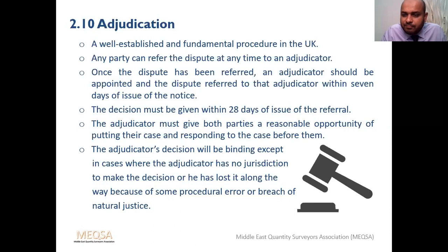The adjudicator must give both parties reasonable opportunities and should listen. The adjudicator's decision is binding unless they go to the court. So what you should understand here is that such a process will be there. There will be a third party adjudicator, he'll be listening to your case. Both will get a similar opportunity. At the end of the day, the adjudicator should give his wording, same like a judge. So to have an adjudicator role, you should have such contract knowledge, as you should write the wording. And if there is any issue on your judgment, you should be accountable as well. So it's a good role, a potential role Gulf countries are looking forward to.